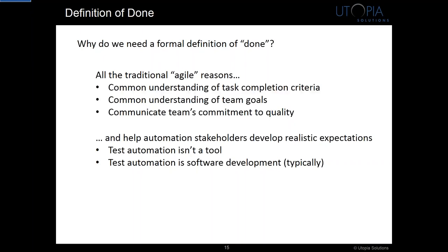This has evolved quite a bit since our first attempts at Agile, but we learned from our mistakes. When we first started, we were very much focused on velocity, which is probably typical of teams new to Agile. But we maybe took our eye off the ball a bit in terms of quality. Whatever velocity we had was really artificial because we were creating a lot of technical debt that had to be paid back later in the project.